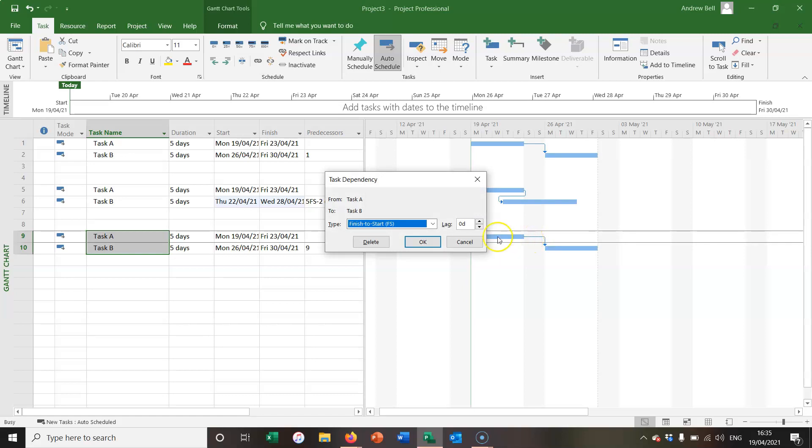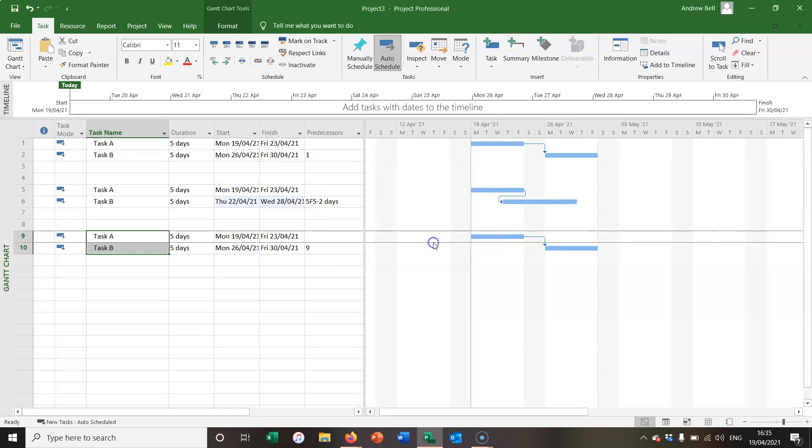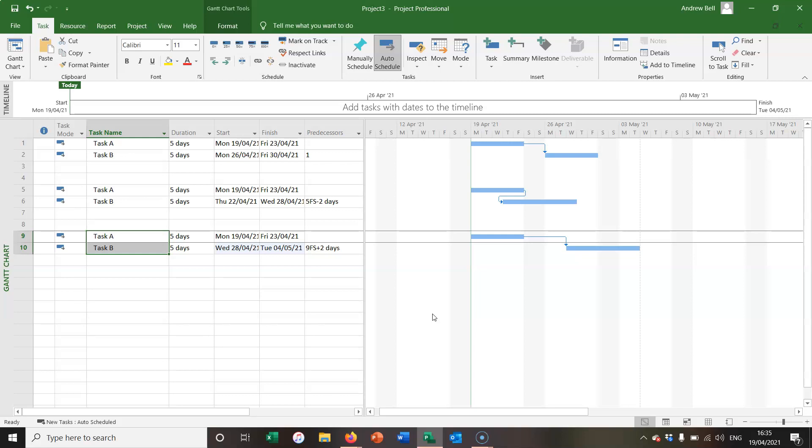And on the second example, I'm going to put two days of lag in. There is now a delay between task A and task B. Maybe it's some paint drying time. But there's an extra two days of delay, as well as the weekends, which is shaded out in grey here. So that's finish to start relationships in Microsoft Project.